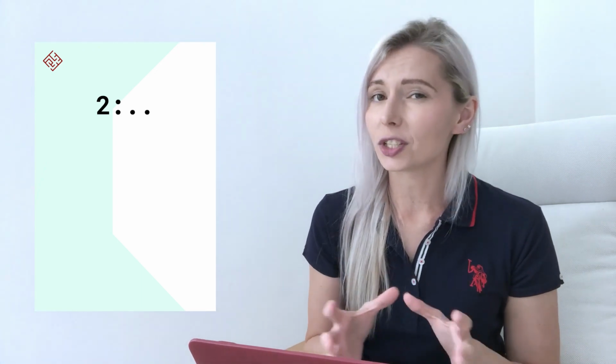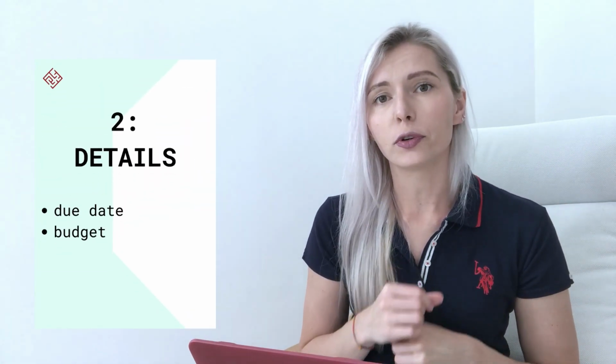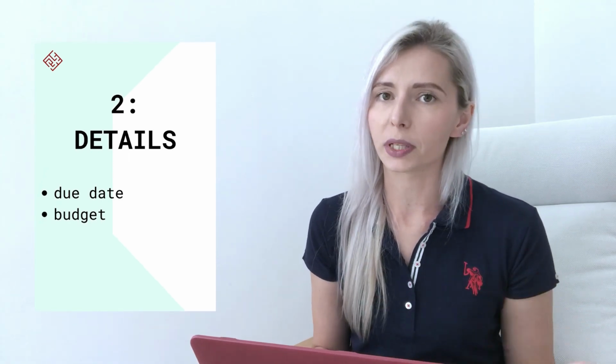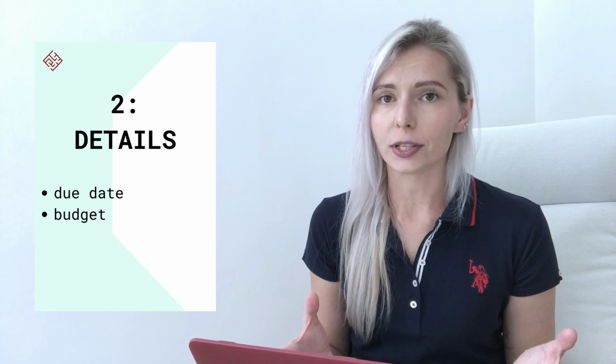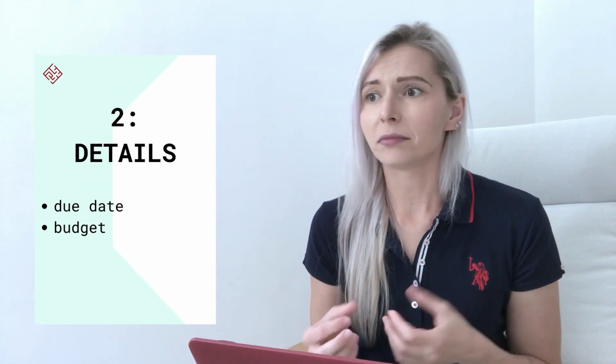Number two, time for some creativity. If you ask me why, I'll tell you that actually there is no rigid criteria on how to create a project charter. However, based on my experience and what I have learned through my career, I do have recommendations on what to include in this document to make it more sufficient. So for the second section, I'm going to write down the project due date and the project budget. If we know this information now, I'm going to include it. If we are going to learn this a little bit later, no big deal, we can write it down later.